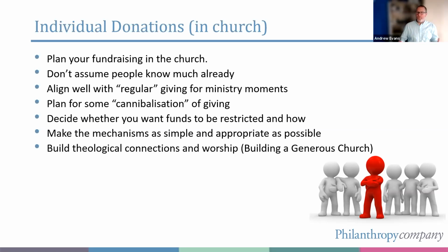So it's worth thinking, how do we want to phrase this when we're asking people to give? Ideally, and particularly with your own church family, what you want to do is ask them to give the money generally to the church, but with the understanding that your plan is to spend it on this project. But if for some reason it doesn't work out, and something happens to heat pump technology that makes it not really viable, and biomass becomes suddenly a much better way of achieving your goal, you can use the funds for that purpose without having to go back to them individually and ask.